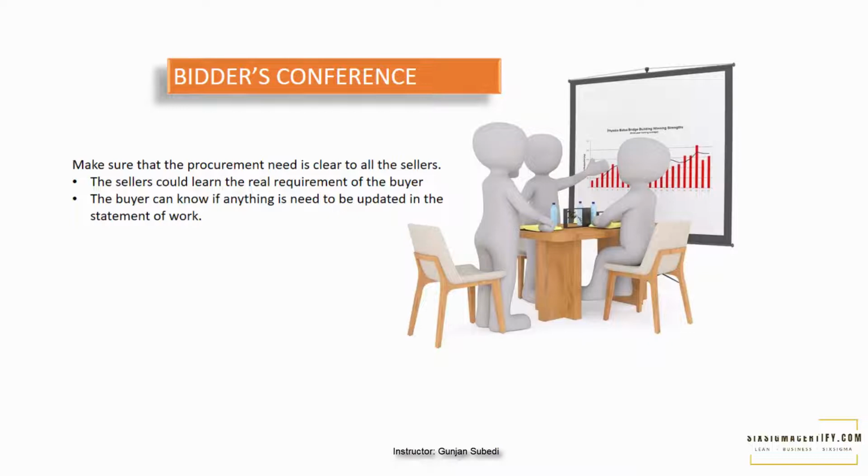So what is the advantage of the bidder conference? The benefit to the seller is the same information is provided to all the sellers. The seller can ask questions to the buyers. The written document of the questions and answers in the conference is provided to all the sellers. The advantage to the buyer is the buyer can know if something is missed. So it could be good if the buyer is making a good statement of work and the buyer can make sure that the seller has enough knowledge of the need of the buyer.